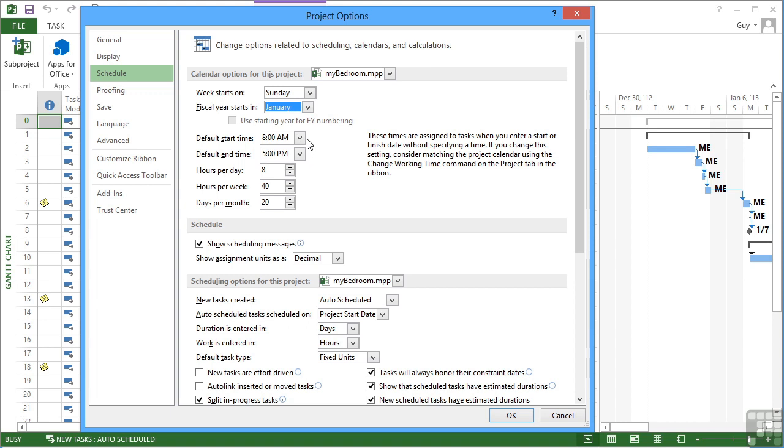If your start and finish time needs to change globally for the whole project, then you would do that here and say, well, let's make our start time now 7am and we'll finish at 6pm.